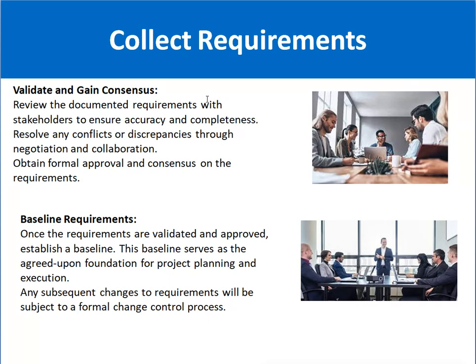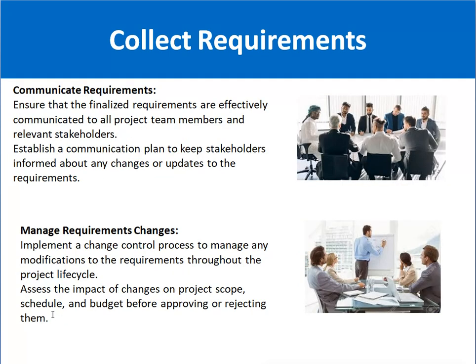Then you have to get the formal approval, or sign-off, on the requirement document. Once the requirements are signed off, this becomes a baseline document. That means the performance of the project will be measured against that baseline document. This baseline serves as the agreed-upon foundation for project planning and execution, and any subsequent changes to requirements will be subject to a formal change control process.